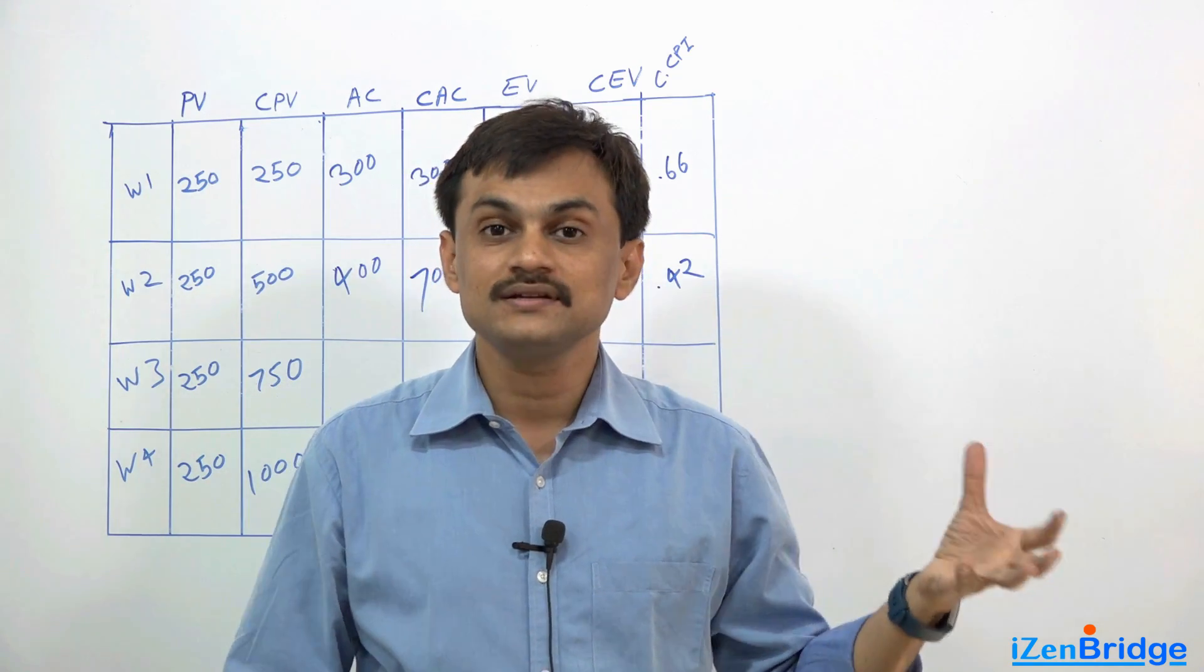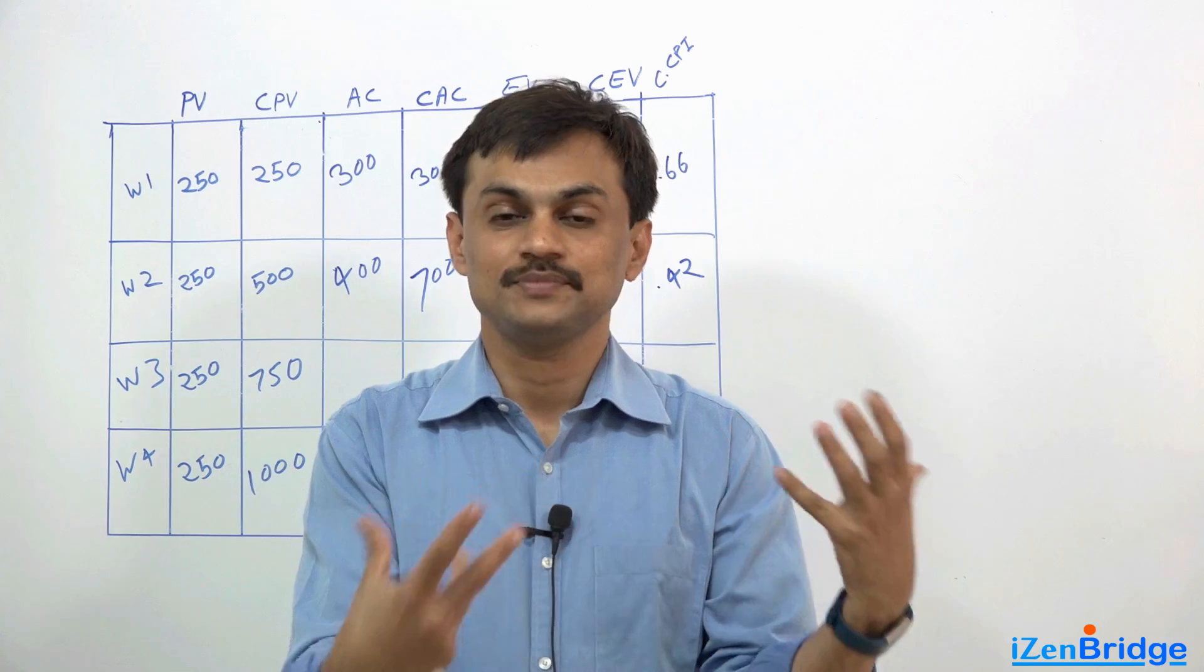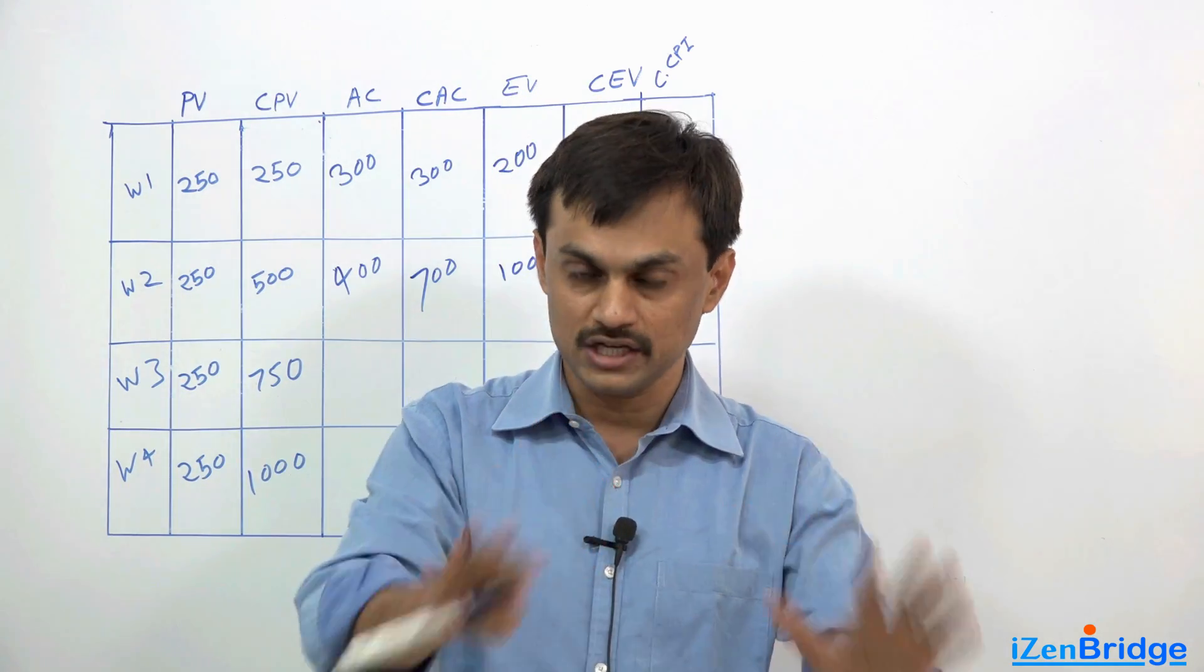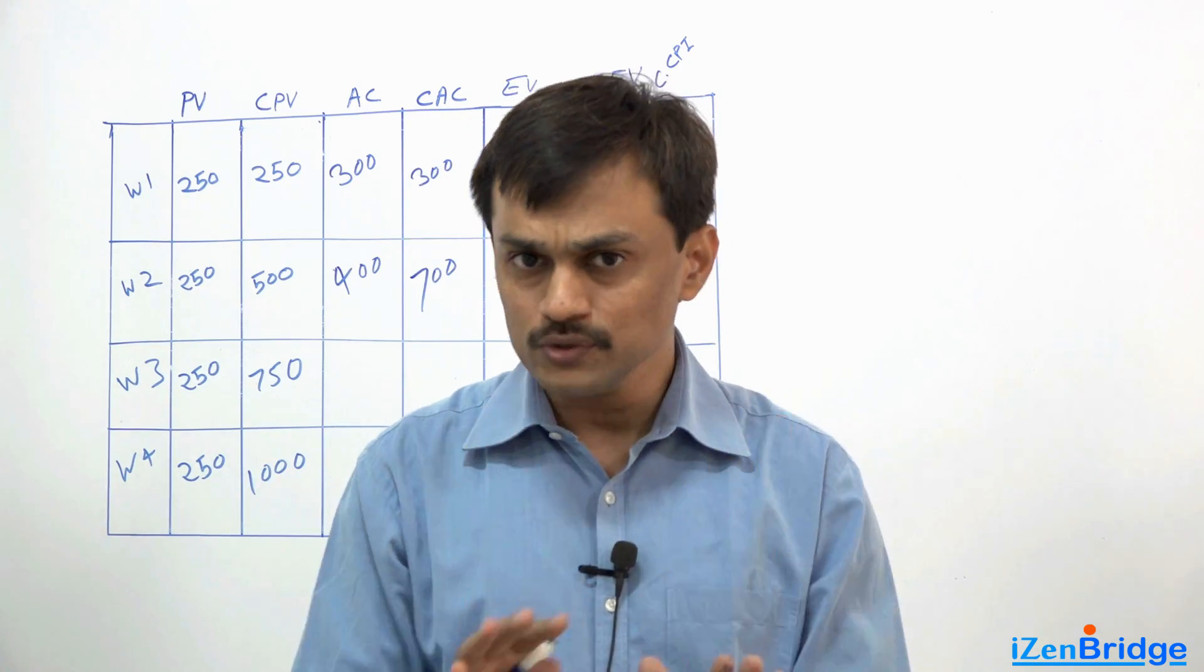To Complete Performance Index equals to 1 shows that we are going everything as per the budget plan. The cost performance index of 1 can achieve it.